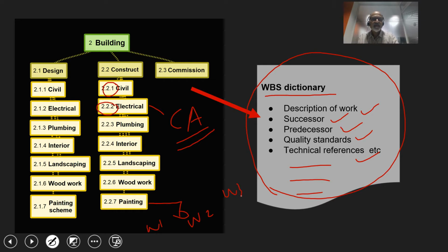For that, there is a rule of thumb called 8/80 rule. An 8/80 rule suggests that work packages can be between 8 hours chunks of work or 80 hours chunks of work, or it can be anything in between. For small projects, the work packages should be towards that 8-hour pattern, whereas for large projects, the work packages can be towards that 80 hours.